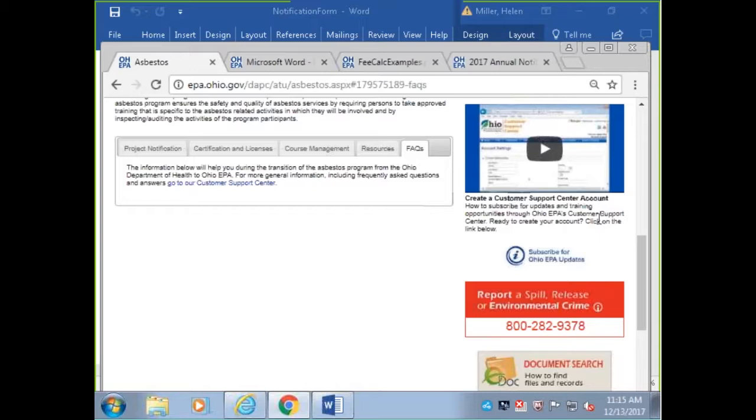If an owner wishes to change a project from project-based abatement to annual blanket basis, can they be notified mid-year? Can they do it in the middle of the year? The answer right now is no. The emission control rules do not allow for submission in the middle of the year. It specifically says it has to be done at the end of the year prior to the year of the annual notification.